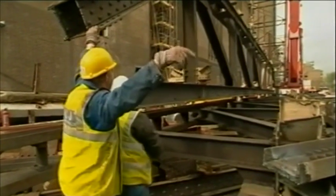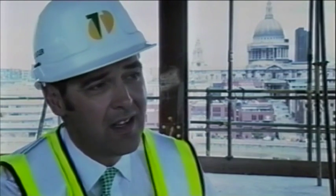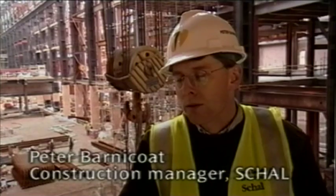I don't think I've ever seen a contractor fail to the degree they failed here. They underestimated everything in terms of its complexity, in terms of the volume of the work, working within an existing envelope, and I think, to be honest, the whole team did. And it was only probably 6-10 weeks into the process that people started realising what we really had here. And I think the whole team have got sympathy with Rowan, and I think we deserve some credit for sticking to the task. The original programme was unachievable.